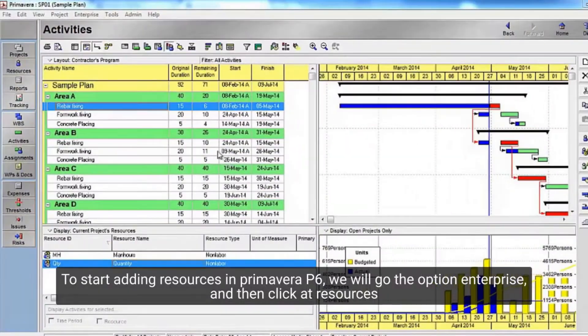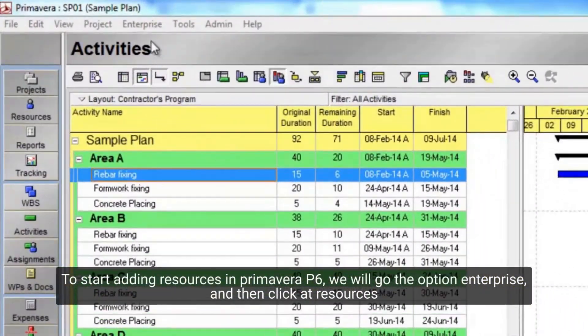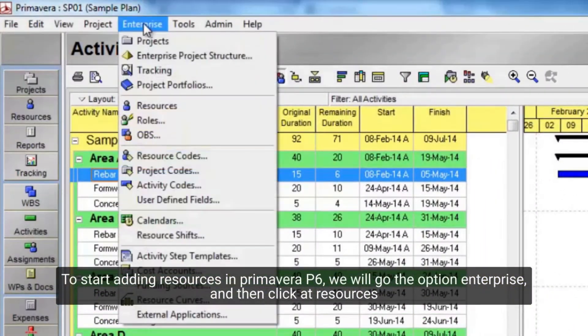To start adding resources in Primavera P6, we will go to the option Enterprise, and then click Resources.